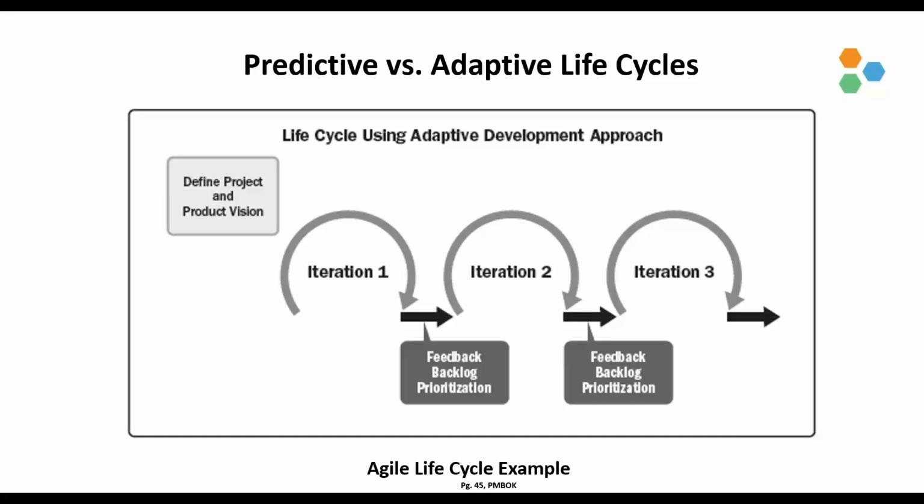Again, a minimum viable product is an increment of a product that is useful enough, in other words, provides enough value for the customer to take delivery of the product and use it while the team continues building the rest of the product. It also minimizes time and resource waste, while at the same time optimizing the efficiency of the processes and also the throughput of the deliverables.